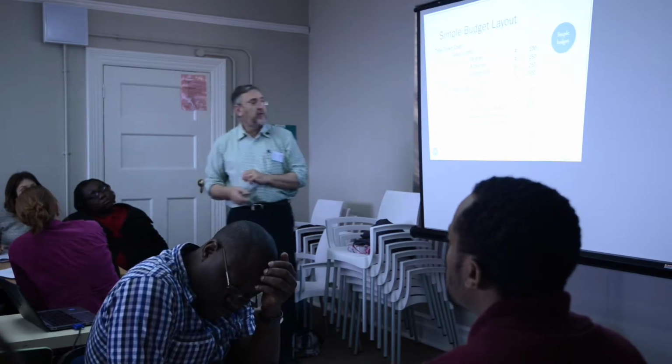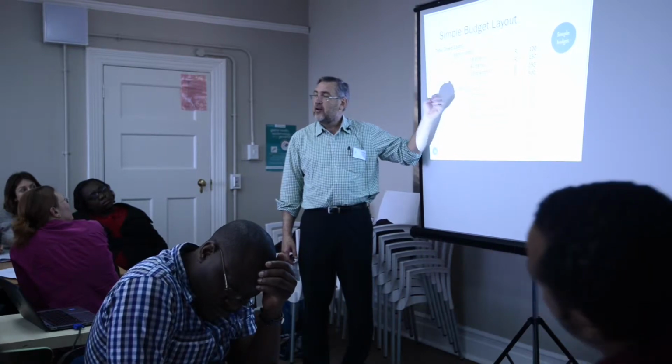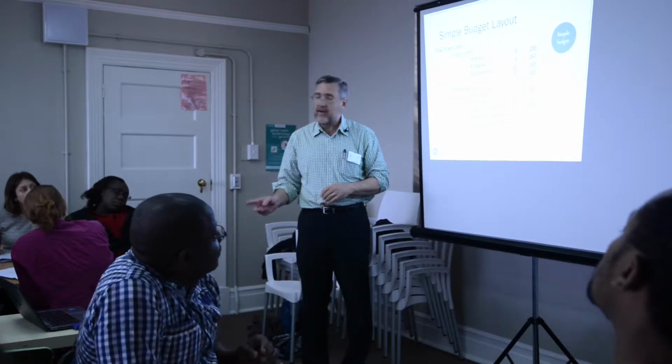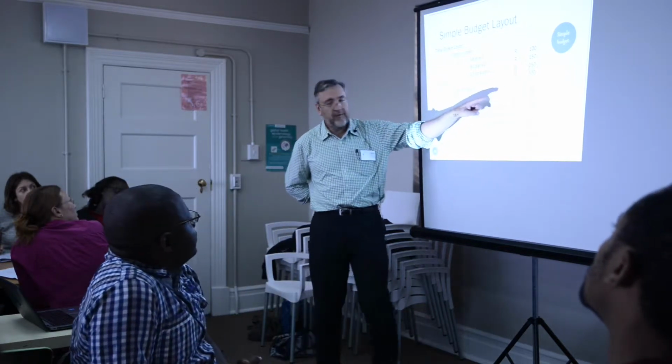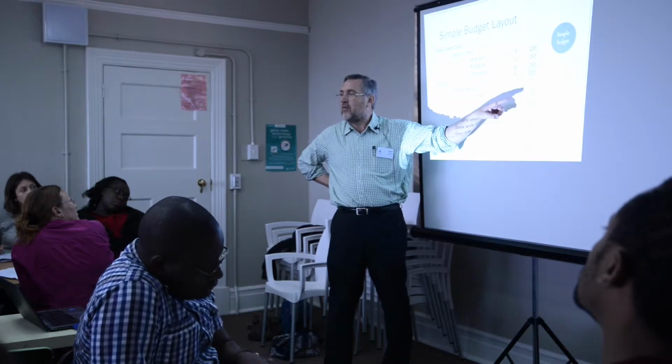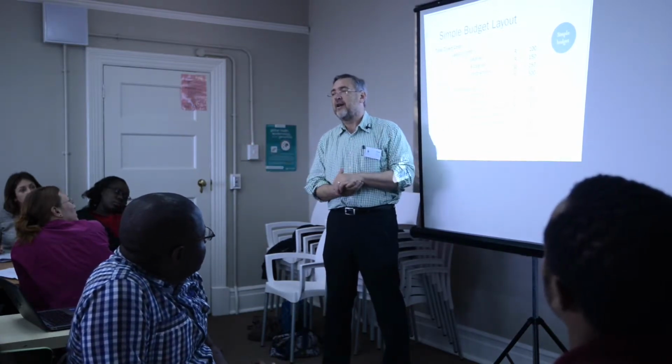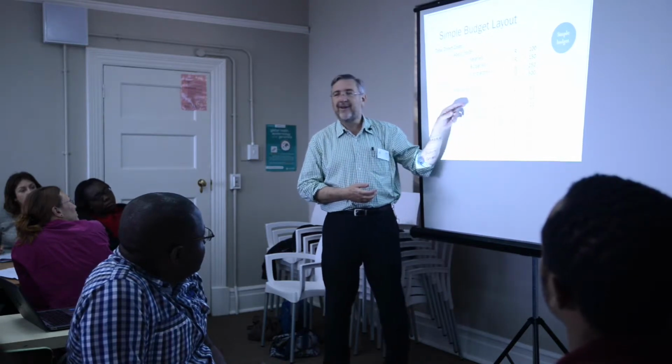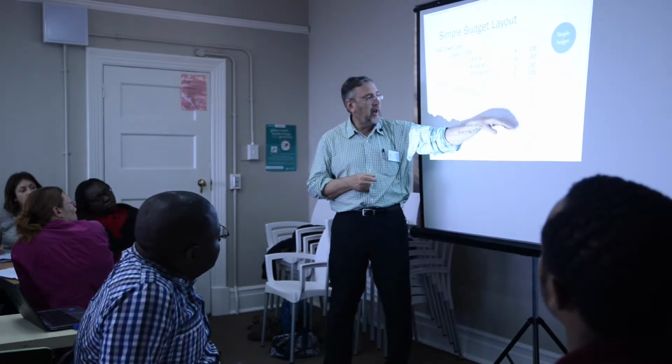What also that points to is, if you make this too fine and too detailed, you can actually create a difficult situation for yourself, because if a funder says, all right, running 50 Rand, do not spend more on running than 50 Rand. But because of the project, especially if it's a 5-year project, how do you know what's going to happen in the 5th year? Do you really? The truth is, I think none of us do. We might have an idea, but if you make it too specific, you tie yourself up in a knot if they insist that you're not allowed to move.